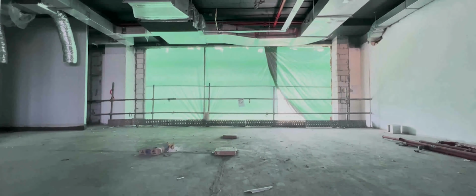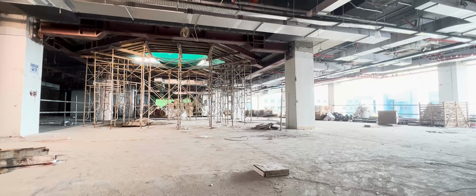It was a sad period because it felt a little bit like being ambushed, and when you're ambushed, the best thing is to charge forward. And so that's where I was trying to make sure that all governmental permits were being filled in time, so we don't forget anything, and that the main contractor is ready to start as soon as possible. And get as many of the subcontractor issues solved as was feasible in that period. So even though there wasn't actual construction happening, there was a lot going on during that period in terms of new contracts being signed and so on.